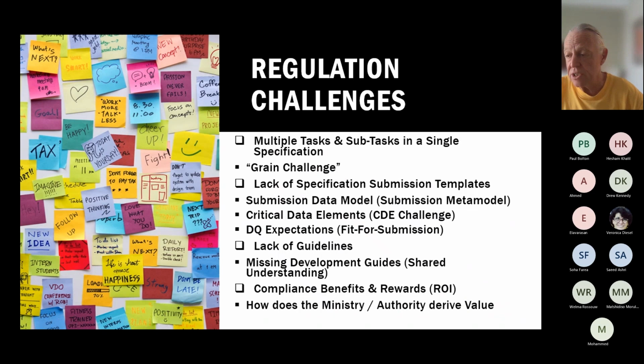When I talk about challenges, this is the challenge that people face when they see those regulations. Sometimes the project managers see, I've only got 191 complete specifications, and I had to do something like 71 or 72 for P1. But what they didn't realize is that task and subtask explosion takes it from just those elements to something much bigger.